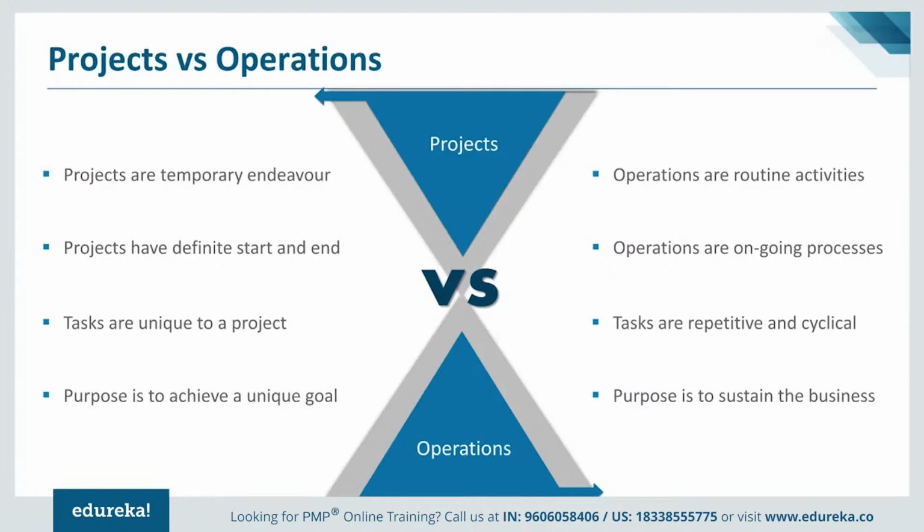However, project activities will stop once you accomplish a project to launch that IT product. So then the project is ended. What will start is the operation activities. So key here is to make sure that there is a proper handover between the project activities and the operation activities. And therefore, you will find that the operations team works very, very closely towards the end of the project.